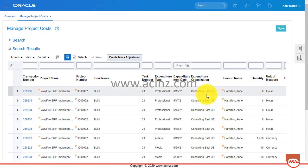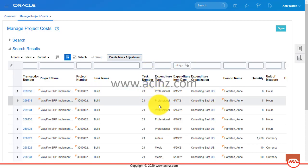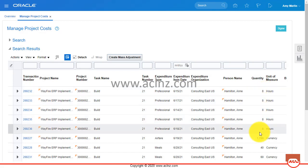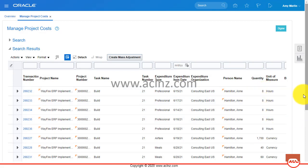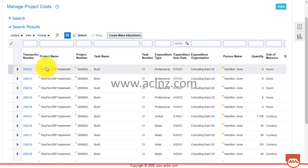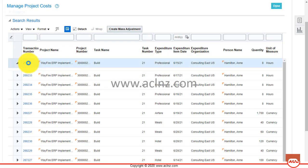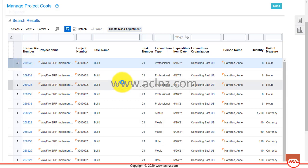As you can see now, the timecards are shown here. You can see expenditure type is Professional, task number 21, and quantity: eight hours, eight hours, eight hours, eight hours — those are the five days charged to this project. You can click on one of these to show the details of a particular timecard.